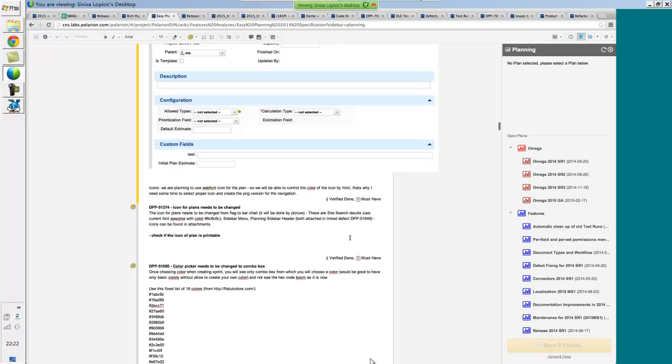We look at the projects, we assign them into different milestones, and then from each milestone we start developing the specifications for each project. One of the POPMs in the R&D team owns it, so they're responsible to ensure that we have good communication channels with key stakeholders, such as the PM, such as the PSOs. We even started expanding out to the customers, so this is to be able to truly relate to them and to understand what is required, and then to work with these people to create the specifications, to ensure that all the design, the UX is prepared.